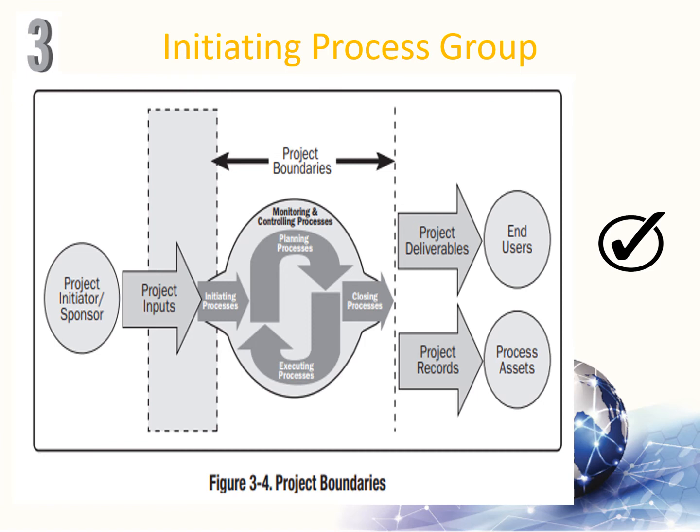A large complex project should be divided into separate phases. In such projects, the initiating processes are carried out during subsequent phases to validate the decisions made during the originally developed project charter and identify stakeholders. Performing the initiating process at the start of each phase helps to keep the project focused on the business need that the project was undertaken to address. The success criteria are verified and the influence, drivers, and objectives of the project stakeholders are reviewed. A decision is then made as to whether the project should be continued, delayed, or discontinued.